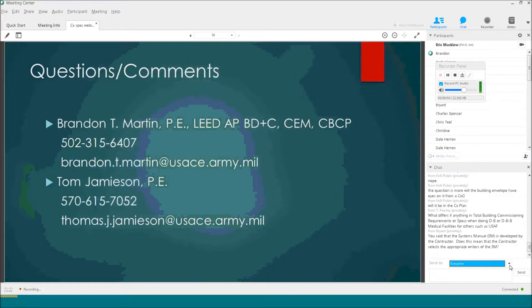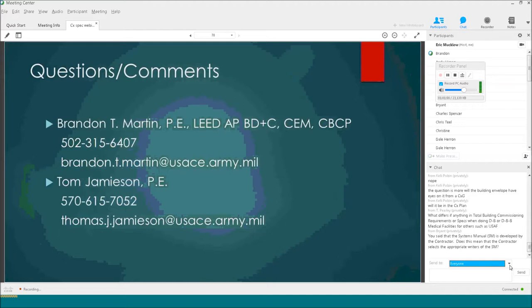Question: You said the systems manual is developed by the contractor — does this mean the contractor selects the appropriate writers of the systems manual? Good question. In the Army version of this spec, the contractor can select who prepares the systems manual — that could be the commissioning specialists or others; we left that open. On the Navy version, they specifically wanted the commissioning specialist to prepare that document. In the Army version, whether the contractor prepares it or has someone else prepare the documents, the commissioning specialist provides a certification that it is complete and sufficient — there is a requirement in the spec for them to give us that certification.